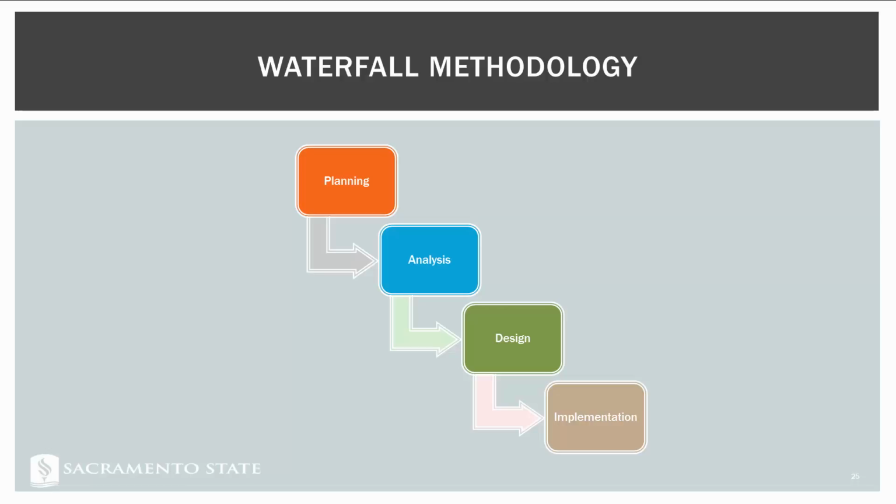This methodology tends to work fairly well in non-IT projects. It has some challenges for IT projects. Here's how it works. You start with the planning phase, you do all of the planning phase, and then you move on to the analysis phase. Then you do all of the analysis phase, and then move on to the design phase, and so forth. And so you do everything without really going back at all.